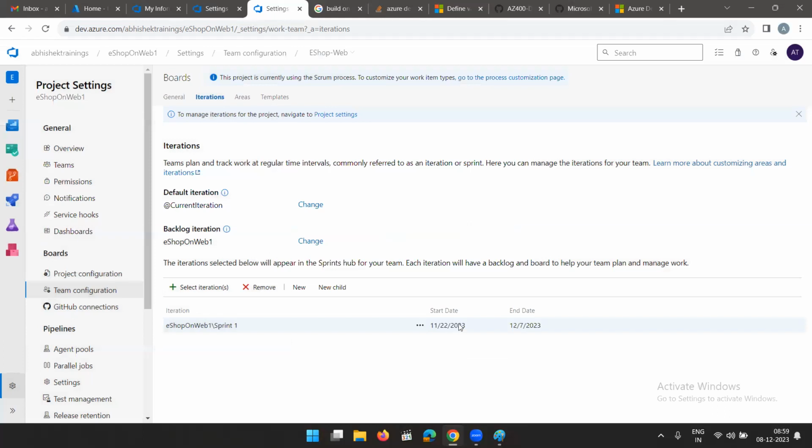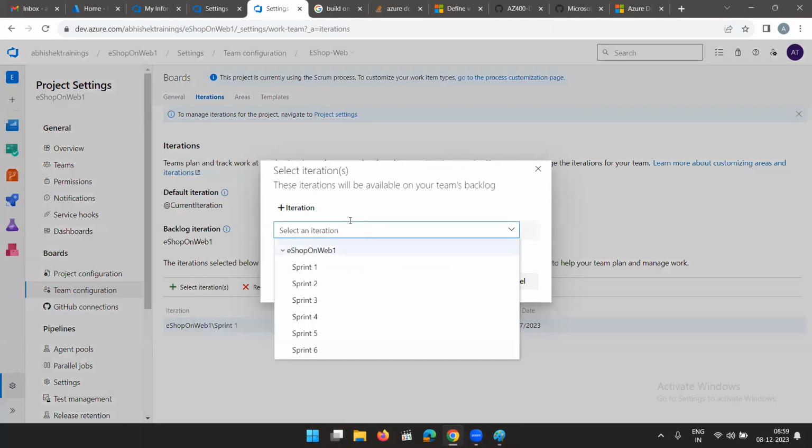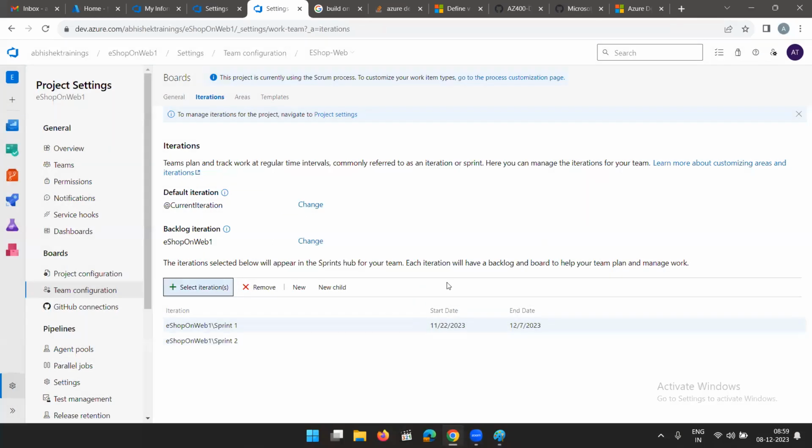Save and close. So now I have set sprint 1. Sprint 1 like this I've set already, it's over. Okay, sprint 2. Now I'll create sprint 2. When you set up sprint 2, it will already take the duration. Since I have set up a 3-week Scrum process, a sprint process, it has taken 3 weeks. If you would have set 2 weeks, it would have taken 2 weeks.